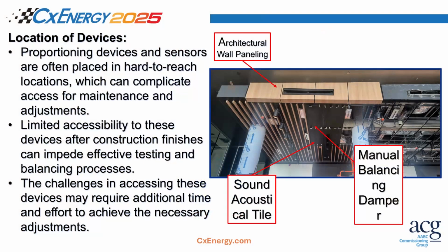And then going into some of the unique features of the performing arts is trying to coordinate with certain trades, because I might need the wall paneling installed to measure the diffusers, but I don't need them to put the slats in the lay-in side of it. Because on that layer, we had the manual dampers above the acoustical ceiling, then we had the slats, which the grills fit into, and then we had the wall paneling.